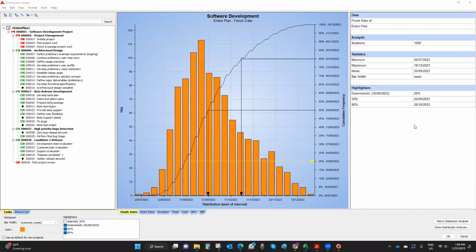Does that make sense? So if I create a plan today for a project that will start next month, and I haven't done any work on the project yet, in Primavera Risk Analysis, my estimates will be called remaining duration. It's just the language they use.